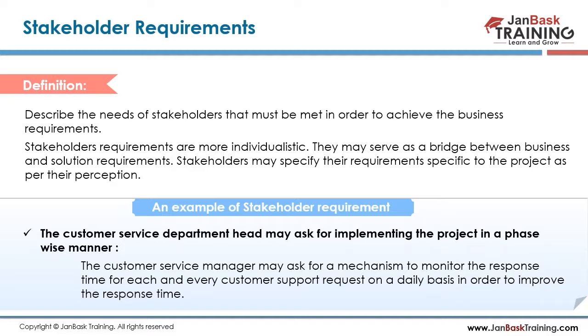You need to have good negotiation skills as well. You can say, hey, I think in this whole product, probably in the first release, we should only go with the product list, because sign in is a very simple thing that everybody can make, and it's just a short effort of time. So let's go with sign in and product first. Probably the second option you can propose is something else.